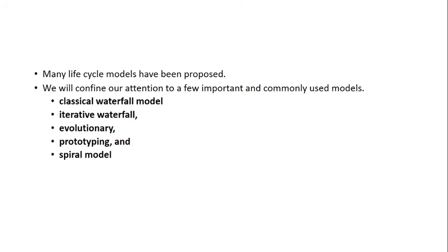Right? So what is the proper approach? Say the prototyping model, I am giving an example. If I develop one page only and I show it to the customer, not the entire 10 pages, on a small scale, I just develop a single page and give it to the customer for evaluation. He gives me the feedback, no, I want it this way, that way, this color, this font and all. So several times I am going to modify that single page as per the customer's feedback.